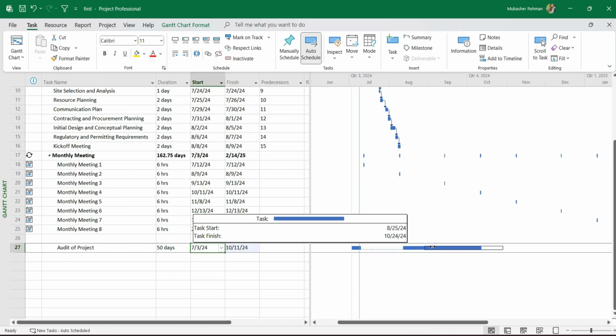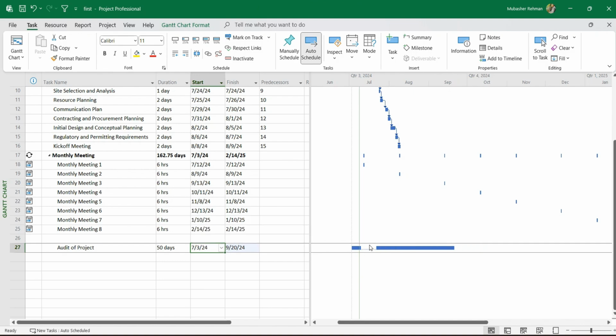So we have to decide on which date it actually got started. We believe that it actually started very close to the end of the first interval, which ended on 7/10 or 7/11. So we will be starting that next part on maybe 7/21. So here you go, we have our first split. But for now, for example, we want to have more splits. So we can do multiple splits on that.